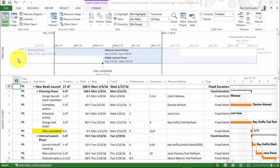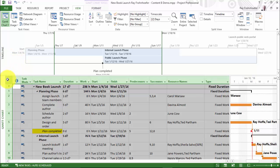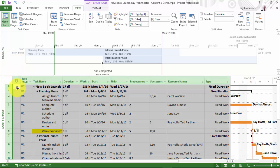I have a timeline and I have a Gantt chart view and the focus of where I am determines what's printed. So if I click on the timeline and I choose print it will print the timeline. If I pick somewhere in the project Gantt chart, the entry table or the Gantt chart, it will print the Gantt chart entry table plus the Gantt chart diagram itself.